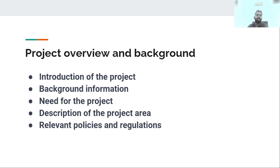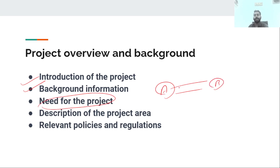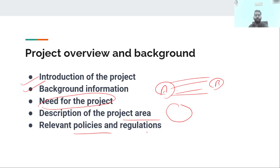For the introduction of the project, we need to provide background information and explain the need for the project. For example, for a highway between city A and city B, you have to do a traffic analysis and survey. If traffic exceeds the limit, then we have to prove the need. We also need to provide a description of the project area — if it is between two cities or a particular area, give a full description. Additionally, we need to reference all relevant policies, regulations, guidelines, and codal provisions.